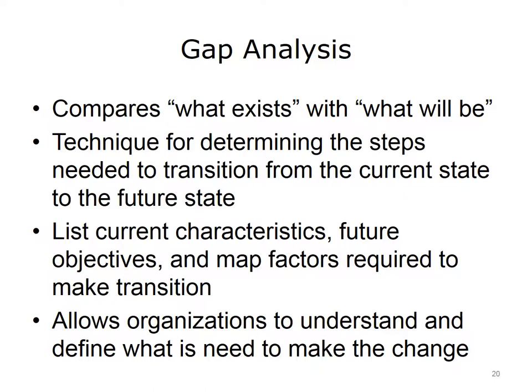A gap analysis can help determine the steps needed to transition from paper records to an EHR. By listing current characteristics, noting future objectives, and mapping factors required to make this transition, gaps can be identified and help the organization understand and define exactly what is needed to make the change to an electronic health record.